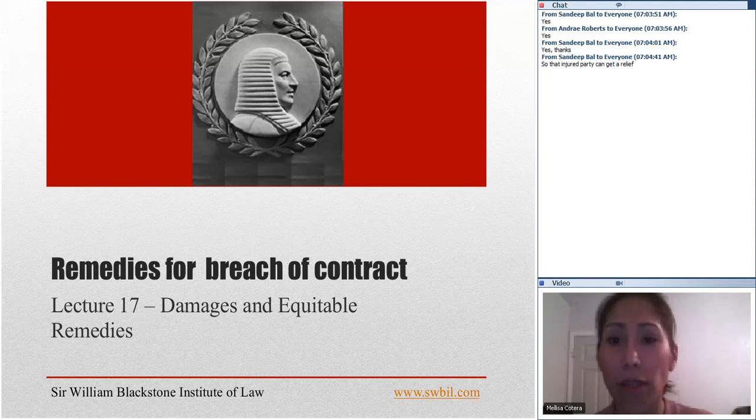Yeah, so that an injured party can get a relief. Yes, thank you, Sandeep. The purpose is to put the injured party in the position this party would have been in, but for the breach of contract. Let's remember that an award of damages in contract law is subject to the application of the rules on causation, remoteness, and duty to mitigate loss.